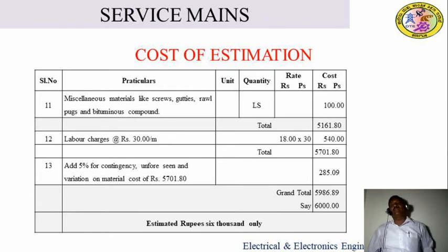As per the given problem, first we have to take the given load and calculate the total current. As per that current, we have to refer to the wiring table to find the size of wire. Then next, we have to find the length of cable, that is the given span length, meter side, pole side and looseness. This total length of the wire has a 10% wastage. So roughly you get 18 meters. And similarly you have to calculate the number of bricks, size of pipes, length of pipes and fixtures.